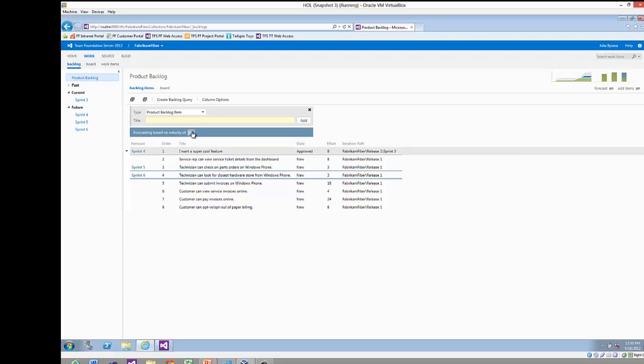Now you can change it from here, let's say I'm going to do 35. Notice it updates automatically, and it's basically saying that these user stories can be assigned to sprint 4, this is 5, and the last one will go to 6. It's just forecasting. It didn't commit it yet. You have to do the work manually, by drag and dropping those user stories. So I'm going to turn it off.